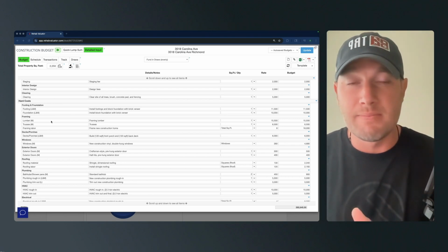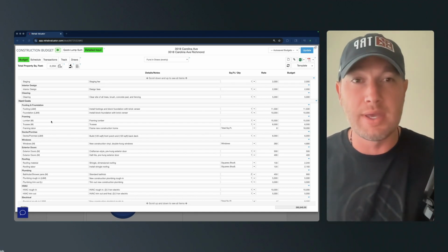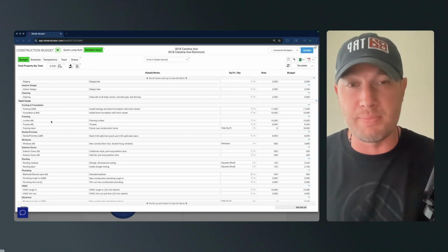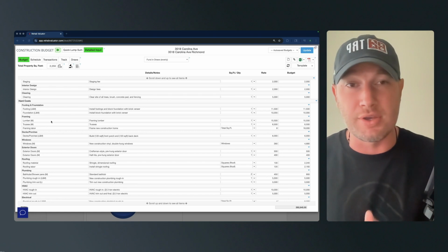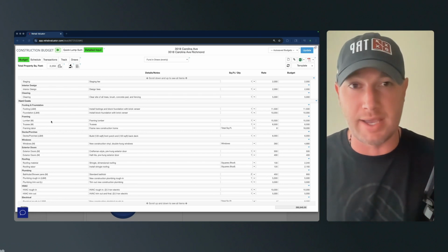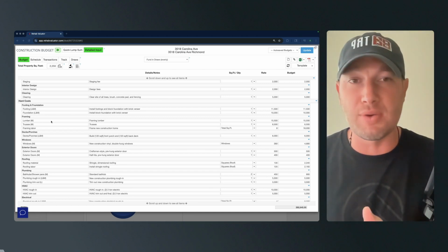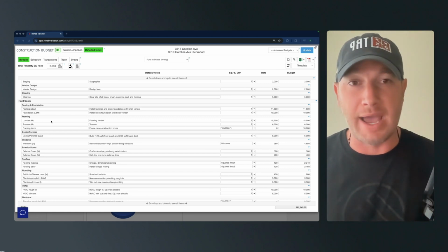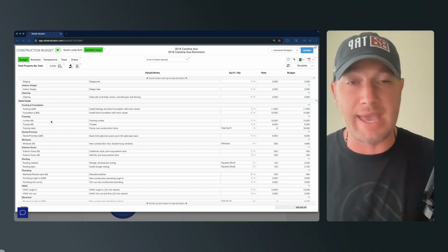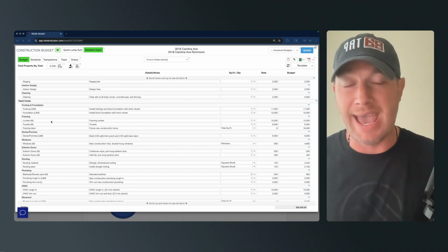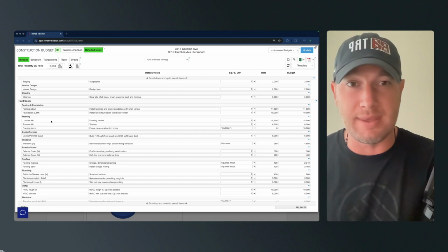So again, my biggest point of going over everything that you need to focus on where you could be at risk is so you know where to put your contingency costs. There's two places you can put contingency costs. You can put it as its own line item at the end, 10%, 15%, whatever. Or you can put it within each line item, and I recommend doing both. Now, with new construction, you shouldn't really have a huge contingency cost as its own line item, because that should be for things that you completely miss.